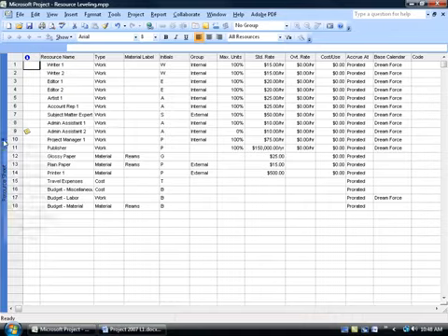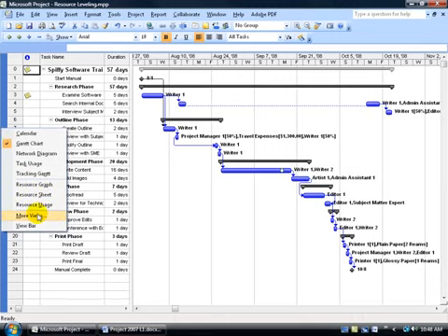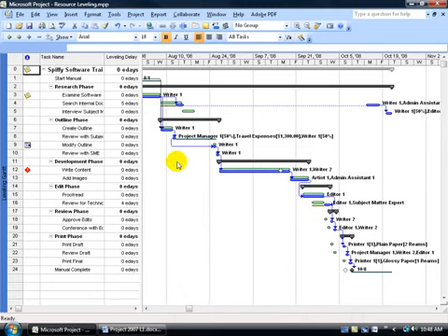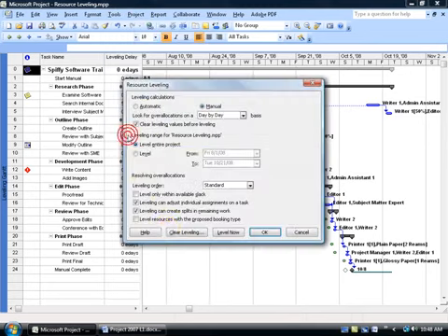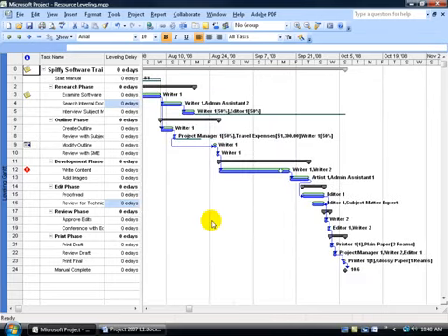So I can right-click, go to the Gantt chart, and I can clear the leveling here, or right-click, go down to More Views, and go to the Leveling Gantt, double-click on that, where we were just at. Come up, click on Tools, go down to Level Resources, click Clear, say you want to clear the entire project, and click OK. And as you notice in this view, we're back to square one, because we have the greens, the pre-level, lined up with the same colors of the blue bars, which is after leveling. In other words, there's no leveling that's been done.